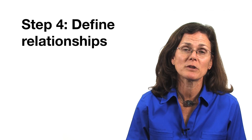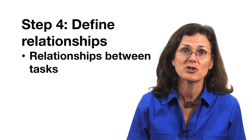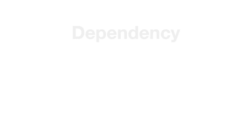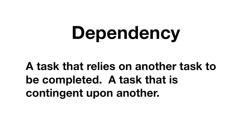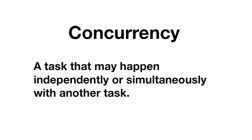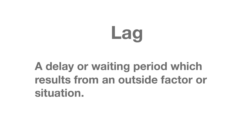Step four is to define relationships between the tasks on your list. Some of these relationships might be concurrencies, dependencies, or lags. A dependency occurs when there's a task that cannot be started before another one is completed. Dependencies occur several times in this Gantt chart everywhere that wood must be cut before it is used to build a structure. A concurrency refers to tasks that are independent of one another and thus may occur simultaneously — for example, ordering materials at the same time that we're planning for the building process. A lag is a delay or waiting period which results from an outside factor or situation, and you need to include these time lags in your Gantt chart. For example, after you order supplies, there will be a several-day time lag before these supplies arrive and are ready to be used in your project.